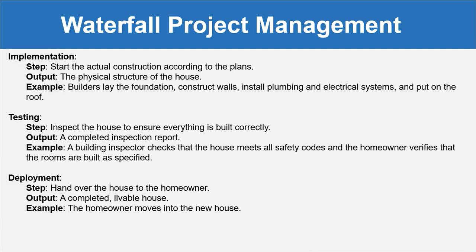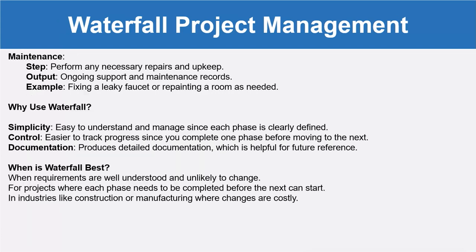Then deployment means handing over the house to the homeowner. The output is a completed, livable house — for example, the homeowner moves into the new house. The maintenance phase then comes, in which we perform any necessary repairs and upkeep. The output is ongoing support and maintenance records — for example, fixing a leaky faucet or repairing a room as needed.